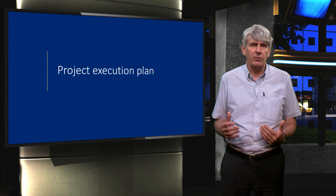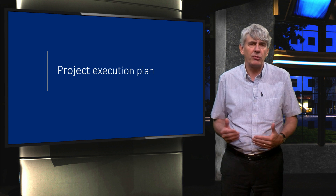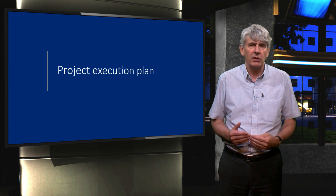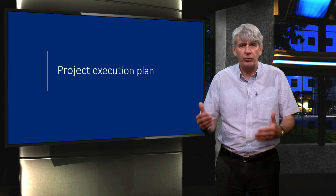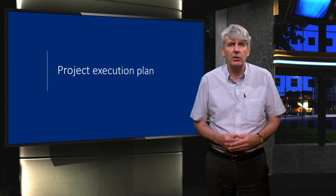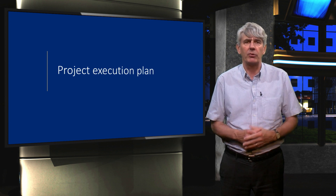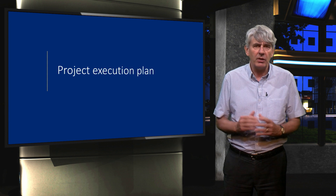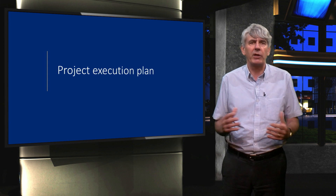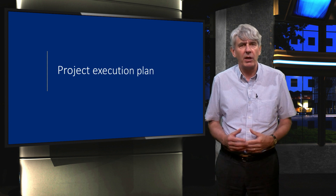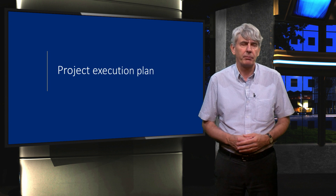However you get to this point — the point where the final investment decision is taken, the point at which the decision is taken to actually construct a project — a project execution plan is a firm requirement. The need for such a document is clear and supported very broadly; however, the name can be a cause of confusion.